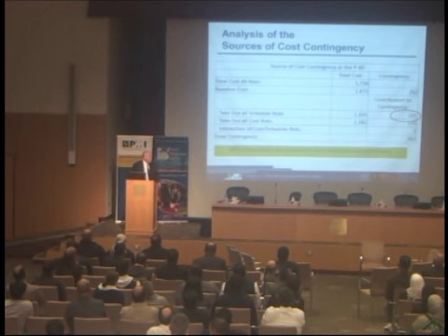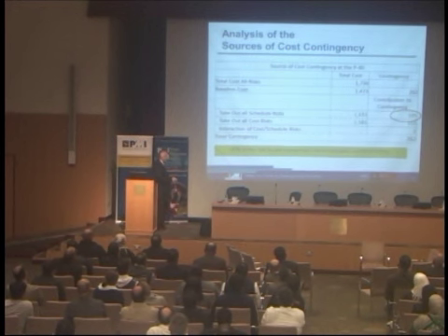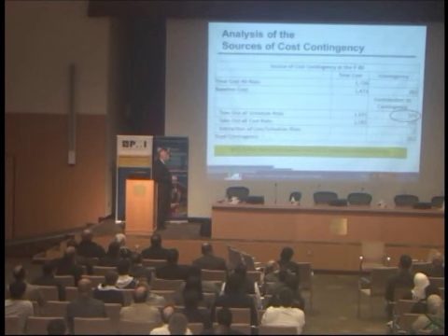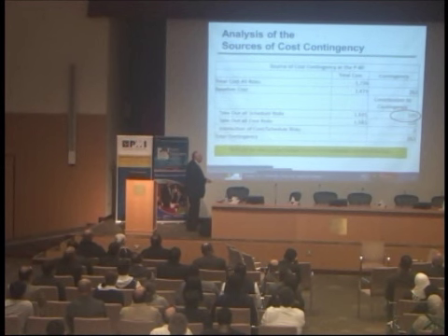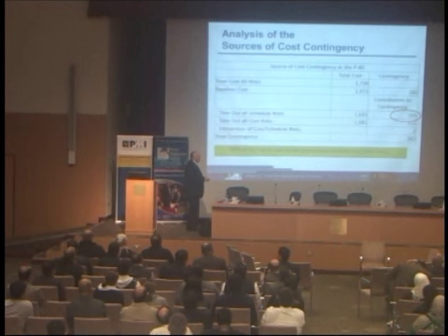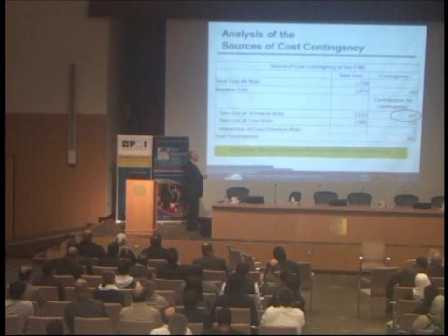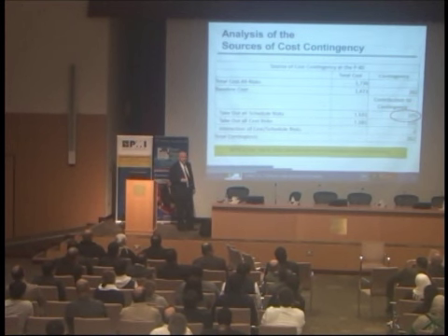Now, here's something interesting. On this particular little example, if you take out all the schedule risks, you lose $105 million of contingency reserve. If you put them back and take all costs in, you lose 155. So of the $262 million reserve that we were talking about, 40% is due to schedule risks. I know because I took them all out and reran it.